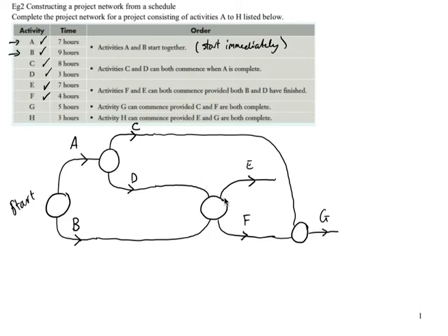Now, we might be running into a problem here. Do you see how this arc here is going to cross this line? It has no way of going to the finish line. Now, because this is the case, we can do a little trick here, and this is why I don't write the numbers on there first, by swapping E and F. It doesn't change anything, it just makes it so there's no intersects. So I'm going to simply change the letters, and you can just do the same, right?